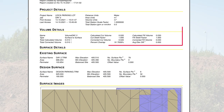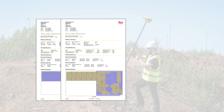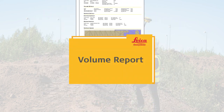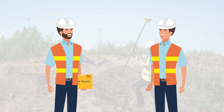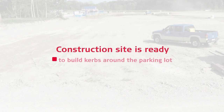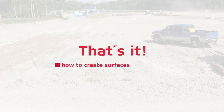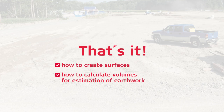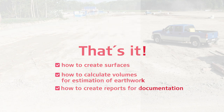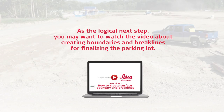A look at the second day's report shows that this work can also be confirmed as done. We hand over the reports to the construction manager. The construction site is ready for the following tasks. We will build the curbs on the boundary of the parking lot and layers of gravel and asphalt. You have learned how to create surfaces, calculate volumes for estimation of earthwork and create reports for documentation of the progress. As a logical next step, you may want to watch the video about creating boundaries and brake lines for finalizing the parking lot.